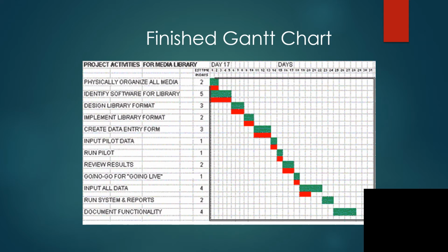Also, Gantt charts do not clearly identify a behind schedule condition. It's difficult to determine the effect on your total project of a behind schedule activity. This is because of a lack of clear interdependencies of project activities. Imagine a Gantt chart with many hundreds of activities. If you try to understand how one activity impacts another and your overall project, it becomes very confusing.